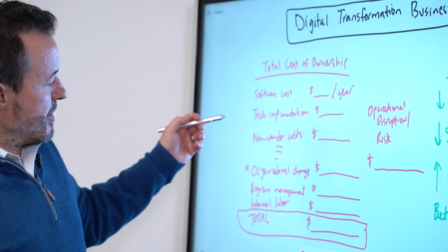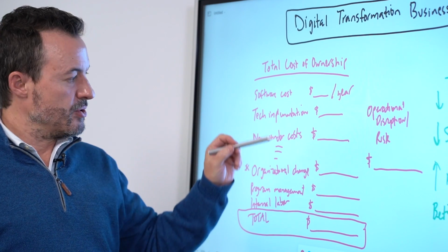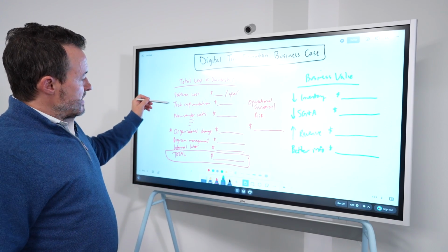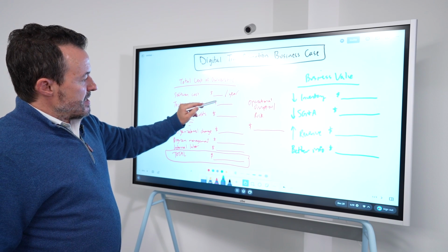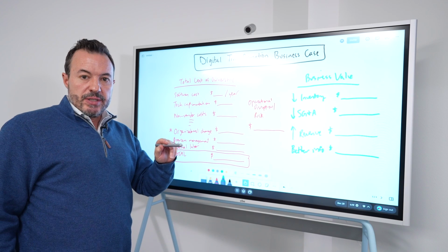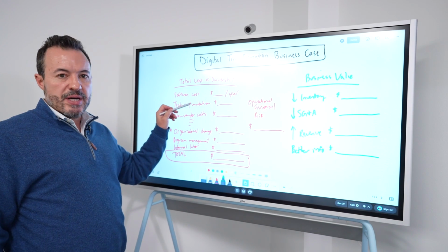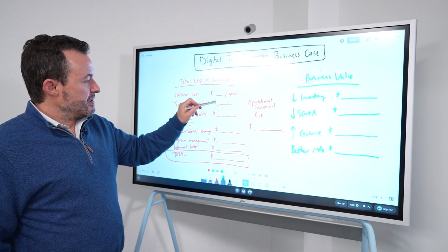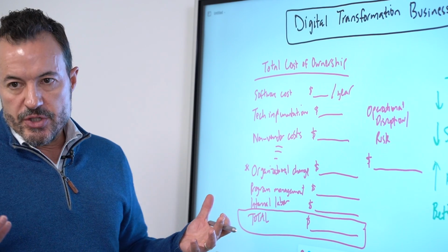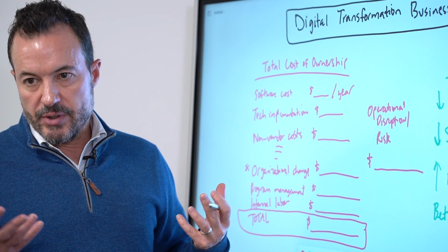And when we look at project governance, there's going to be inevitably decisions that come up during a project to change these costs. For example, a common one is when we look at the technical implementation, we had an estimate here of some amount based on some assumptions. Those assumptions might change during the implementation, and we might find that there is a need or a want to potentially customize the software, which is going to add to our line item here. Now, a lot of organizations will make an arbitrary decision of yes or no, we aren't going to customize based on whatever criteria they have.